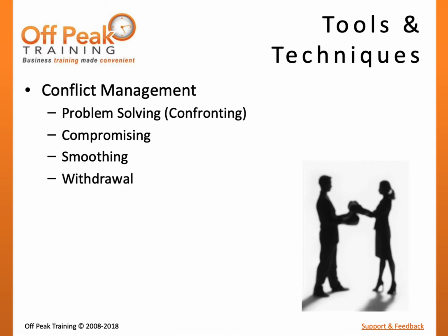In withdrawal, the manager may try to postpone discussing the conflict in hopes that it will not be brought up again or it's resolved on its own. This goes against the proactive theme of project management and is not a good resolution. Withdrawal is also known as lose-leave.